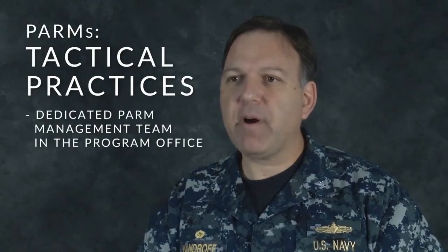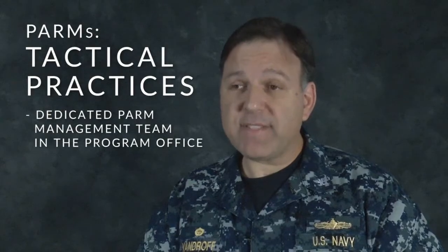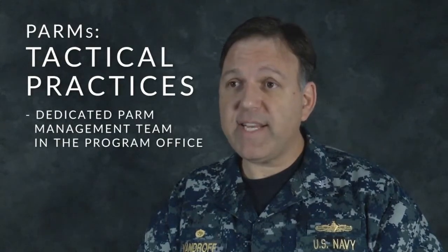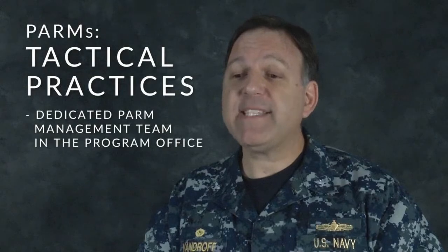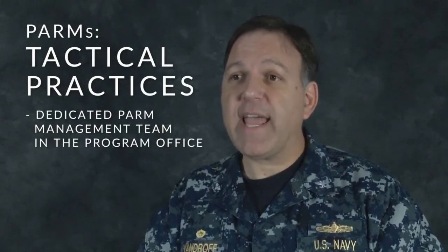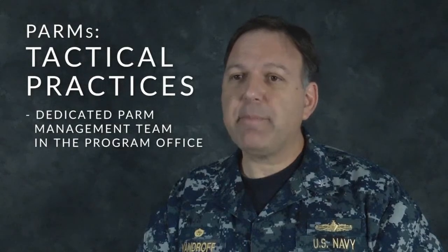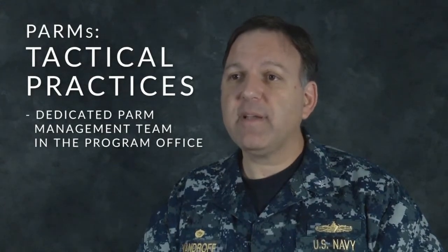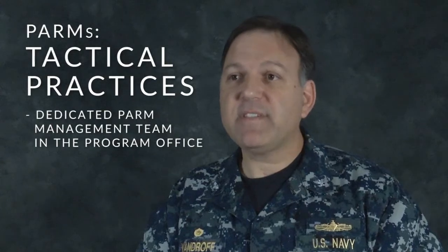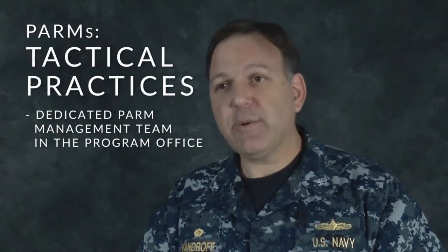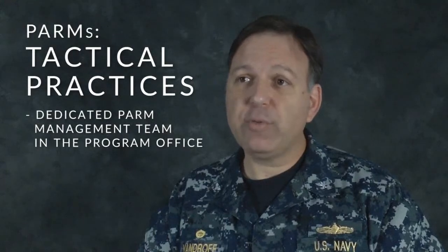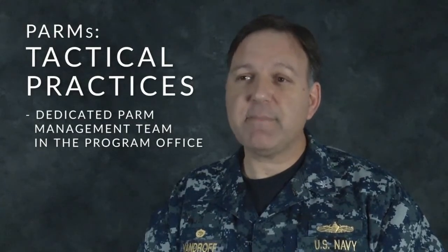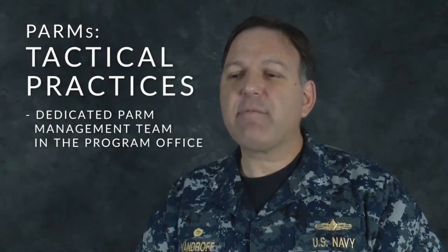So let me give you some tactical best practices if you're a program manager and you have PARMs. First, you need a dedicated PARM management team in the program office. In fact, in the program office that I was the program manager for, the DDG 51 program, our PEO had a separate, since all of the program managers under that had multiple PARMs, there was a separate PEO staff code for PARM management. They provided PARM management services to each of the programs in the PEO. You might do it that way with your PEO, or your program might have its own dedicated PARM team, but you cannot have this managed as a collateral duty. You have to have regular PARM reviews.